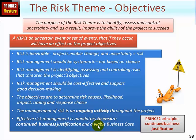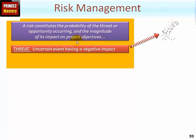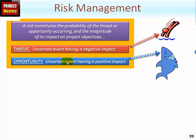Since risks potentially affect the project's objectives, without effective risk management you can never be certain the project will meet those objectives and hence maintain a viable business case. A risk constitutes the probability of a threat or an opportunity occurring and the magnitude of its impact on the project objectives. A negative threat is an uncertain event which if it occurred would have a negative impact on one or more objectives; an opportunity is uncertain but would have a positive impact. Effective risk management seeks to minimize threats and maximize opportunities.